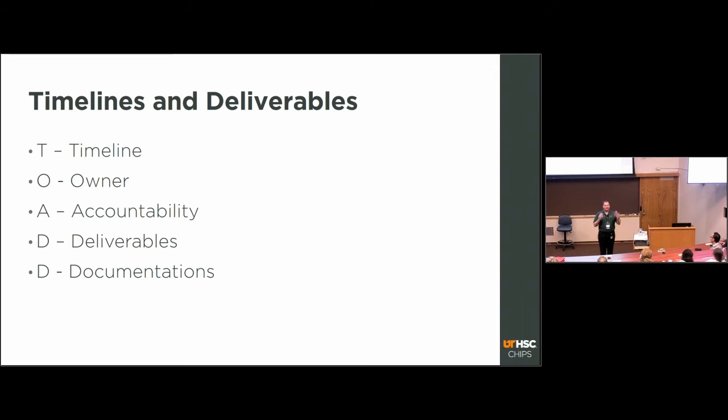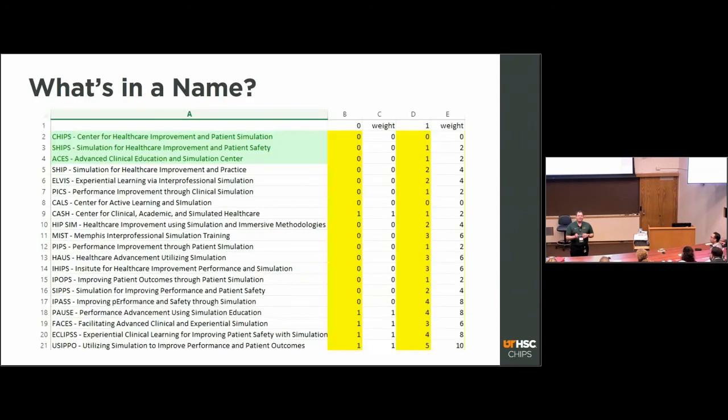Instead of approaching our AV integrator, we did not have a great AV integration. And I should say, our AV integrator is not exhibiting here. So all the folks exhibiting here are probably going to be just fine. We had some issues with the hours, but a lot of it was because our system office dealt with our AV integrator through purchase orders instead of contracts. I mean, it just wasn't done quite right. All right, so moving on.